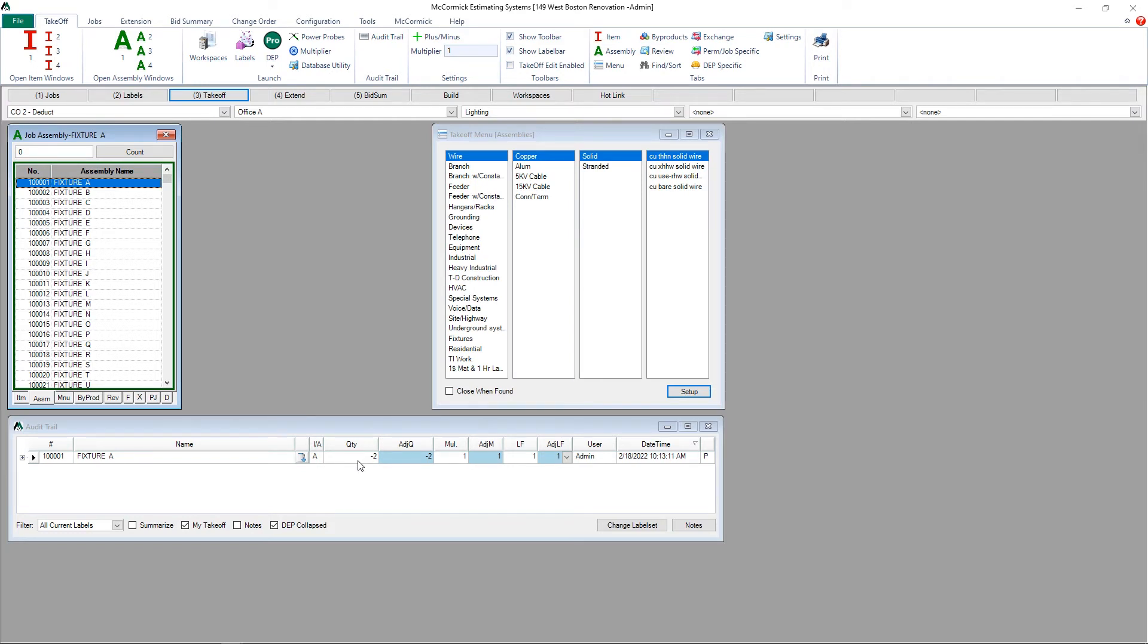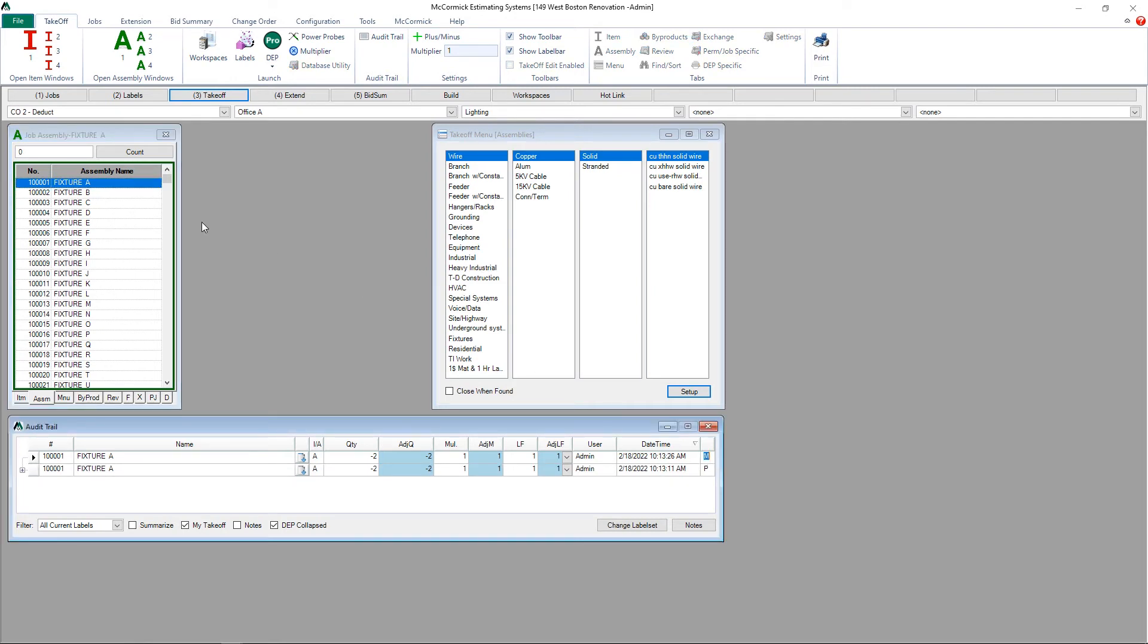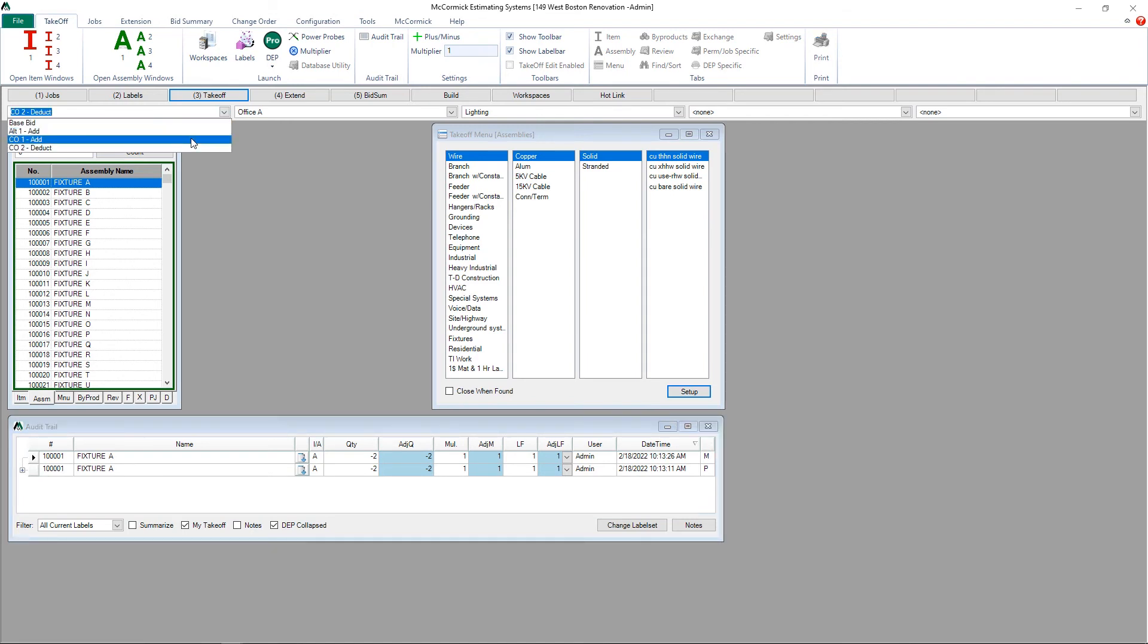If you don't want to do the Change Order Takeoff on the plan, you can always do Manual Entry Takeoff. For that, we'll simply select the part in the database, type in a quantity, either positive or negative, and hit Enter.